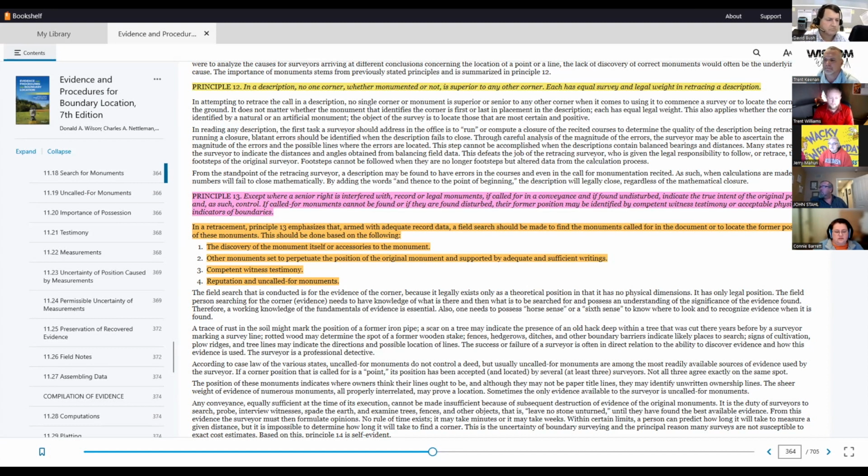Yeah, for us, the company policy is that the project manager needs to secure crews' access to the property. Unfortunately, we do a lot of commercial and land development projects, so we don't deal with the individual homeowners very often. But sometimes they're abutting your property, and if needed, it's the project manager's responsibility to understand the relationships and whether the crew is at liberty to walk around and look for the monuments, or if there is special permission or notice needed.